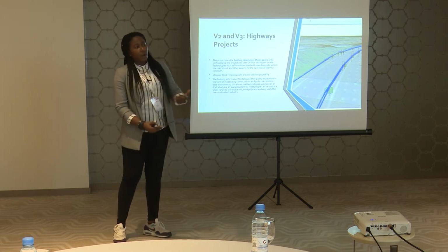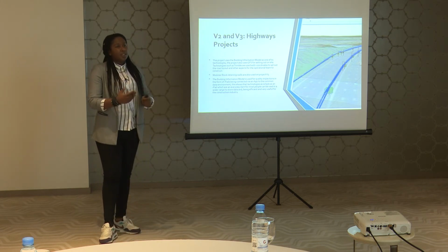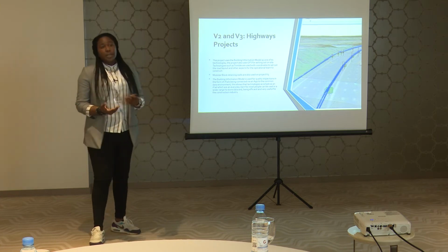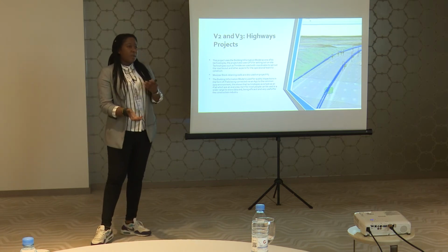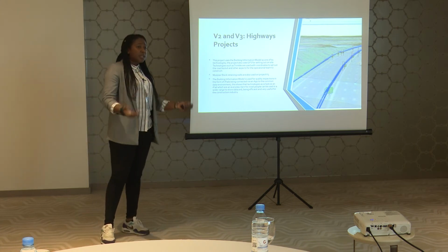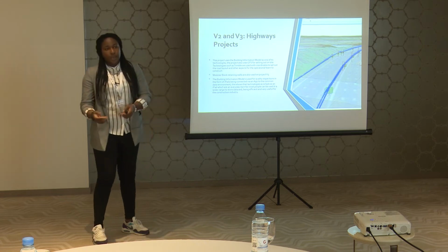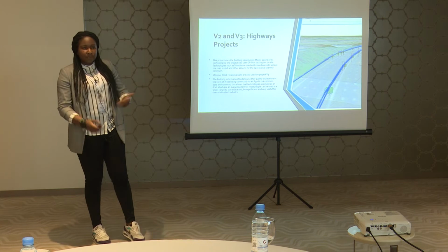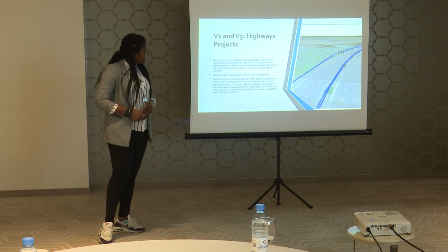The thing about Industry 4.0 technologies is it can be as simple as having an iPad on site. What this project did was they basically had the check sheets and everything done into the common data environment. So the site team would take an iPad outside, instead of having to take out paper and ticking it off, coming back into the office, having to scan it and then import it into the common data environment, which would take time, and they might also lose some of the papers, so loss of data. So this was one of the good things that they did. As simple as an iPad, you could be having an Industry 4.0 project.